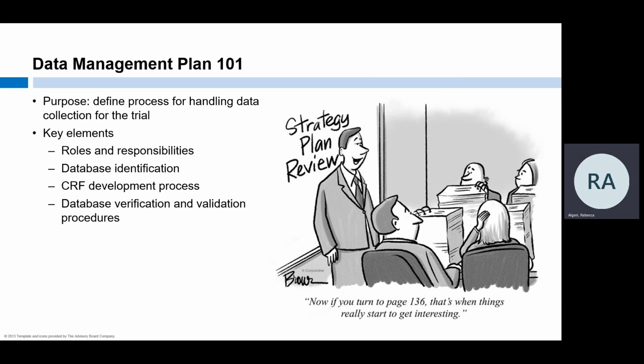What database is going to be used for the study? Is it 21 CFR Part 11 compliant? Does it need to be? Remember that clinical trials conducted under an IND or IDE that will manage or store data electronically need to have a Part 11 compliance system.